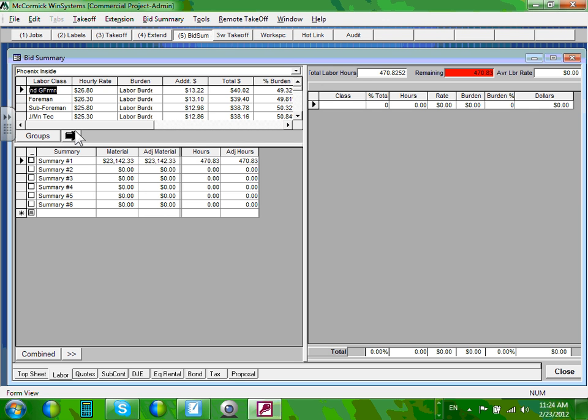3 electricians. This is page 3 circled, item number 3, dot number 2. It says your electrician crew will consist of 3 electricians, who will make $33 per hour each, and 6 apprentices who will make $20 per hour each. Cool? All right, let's go pick them up.